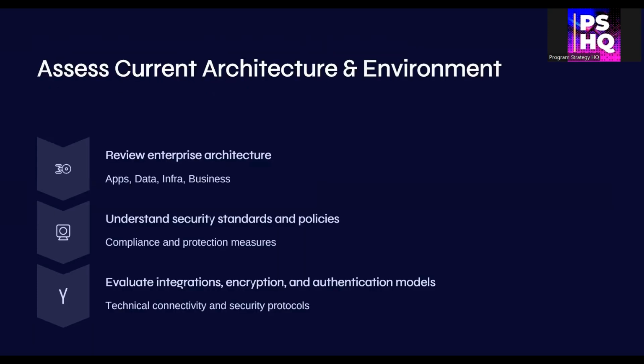Before you implement anything, understand what's already in place. Review the enterprise architecture, the business processes, data models, infrastructure, and applications. Assess security standards, encryption methods, and authentication protocols. The goal is to know what you're integrating with and what could break.